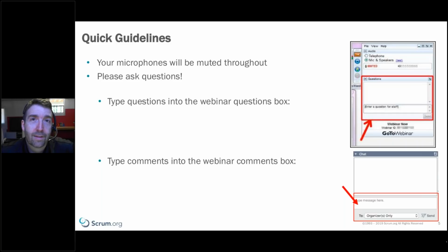Here's the concept, and your definition of done should grow over time. So the first thing that I would suggest is that you have one, and you who asked the question maybe already have one, so you think, well, of course, I've already got one, please move on. But I'm thinking about the other people on the webinar. Have a definition of done, and the definition of done needs to have the items in it that if those items are checked, yes, we did it, yes, we did it, yes, we did it, and did it to the quality expectations that you collectively hold to be important, then if you met that, then you could call the work done.